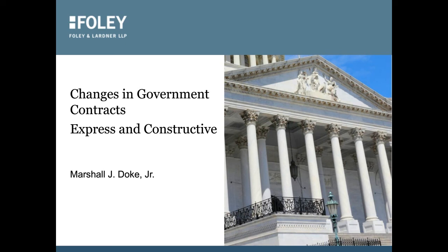Most government contractors have a cost accounting system in addition to financial accounting, but except in major contract modification, work orders normally are not established to accumulate different costs. The cost of changes more frequently are estimated based on other cost items or experience. Government auditors may choke on the phrase "estimated actual cost." But I use that in litigation because I want the judge to know that you have already incurred the cost, you just didn't accumulate it, and it's estimated. And if you do that every time, the auditors just go bananas when you say estimated actual cost.